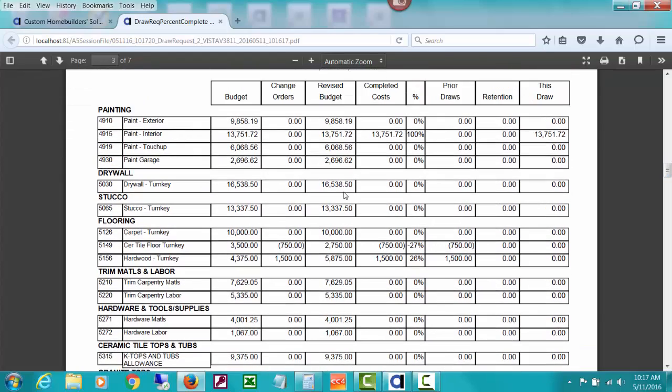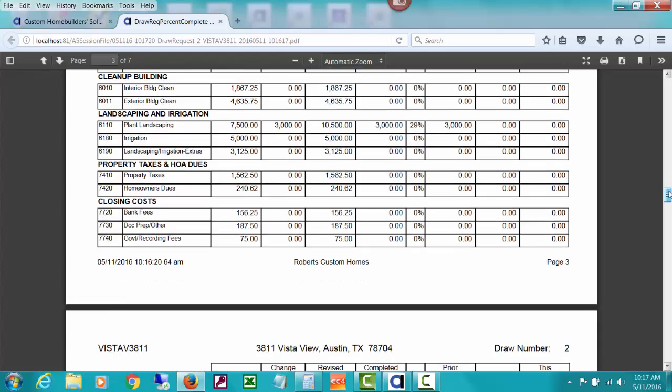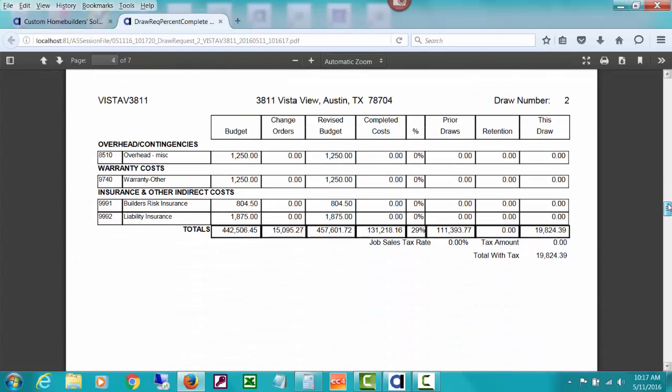Notice that this column is change orders. You can explain to your buyer why, even if this is going to happen later in the job, you're collecting change order money up front. And they can see that in the change order column, and that's why you have an amount over here almost ahead of time, because it's a change order, if that's what your policy is.